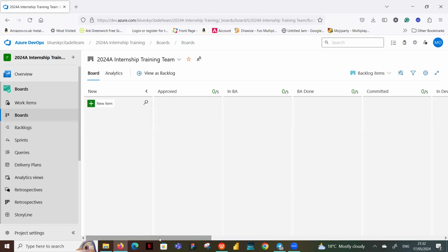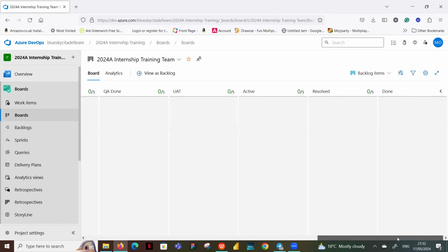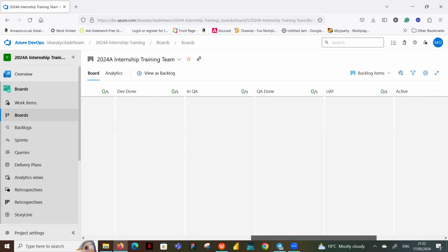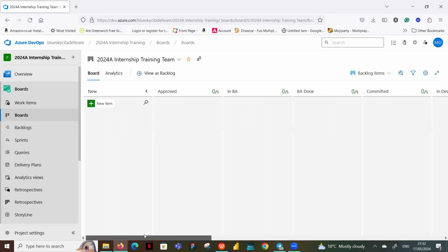Do you see why we need to create the inherited process now? Because they were there, they did some customization on the Scrum process itself. It affected every other project that now started running on the Scrum process. That was what happened. That's why you're seeing all the things you're seeing here now. Which means the customization should have been on an inherited process, not on the Scrum process itself.